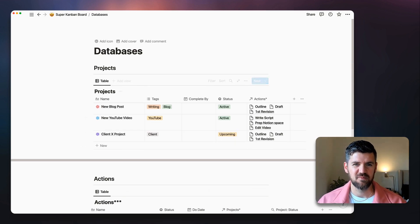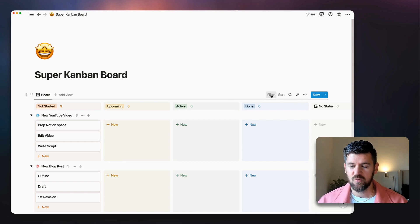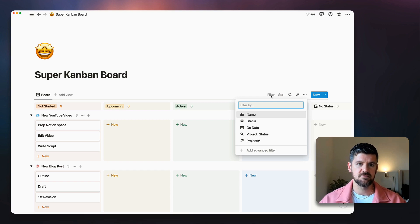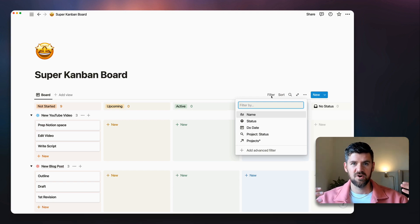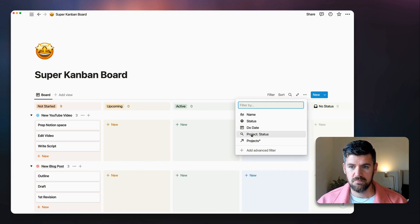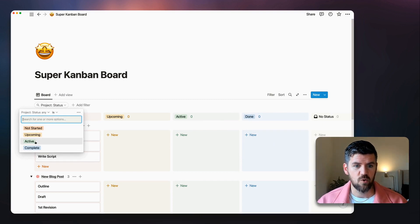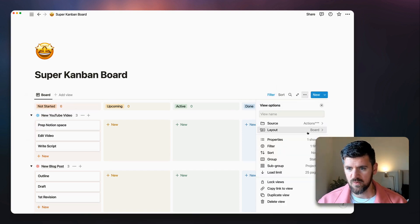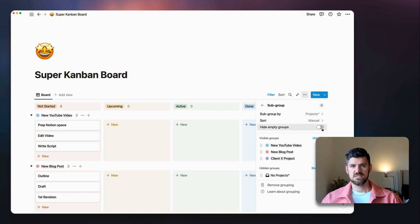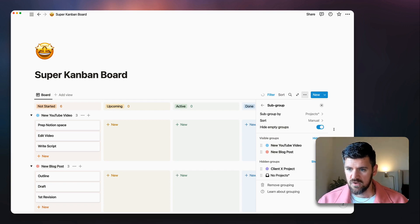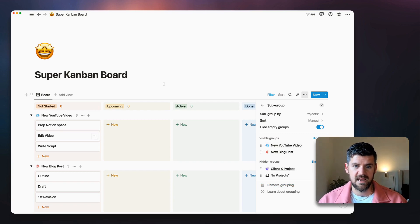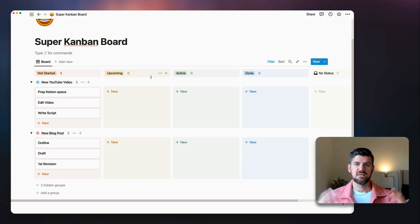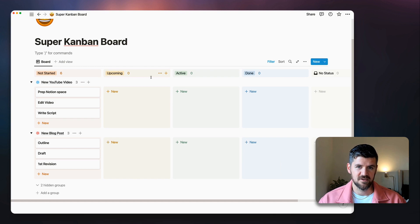Going back to the Kanban board view, I'll create a filter using that new rollup: filter by Project Status, showing only projects that are Active. This way I don't have a super board with every project I've ever worked on. Then in Subgroup settings, I'll hide empty groups, so only active projects appear. The client project moves to the hidden group, and now we've got only our two active projects.